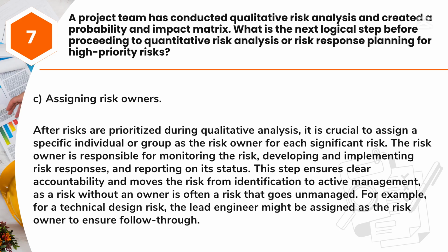This step ensures clear accountability and moves the risk from identification to active management, as a risk without an owner is often a risk that goes unmanaged. For example, for a technical design risk, the lead engineer might be assigned as the risk owner to ensure follow-through.